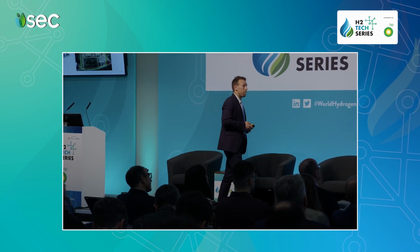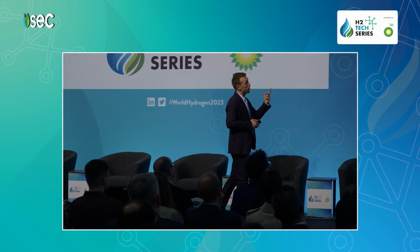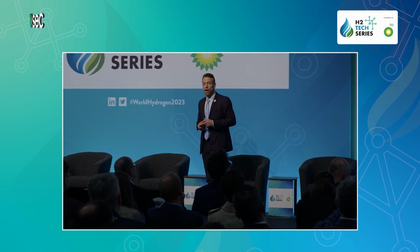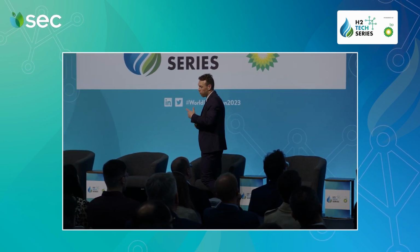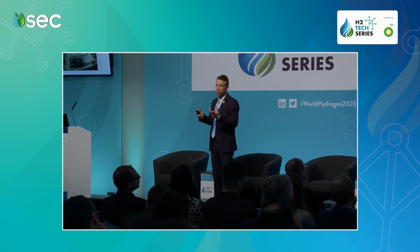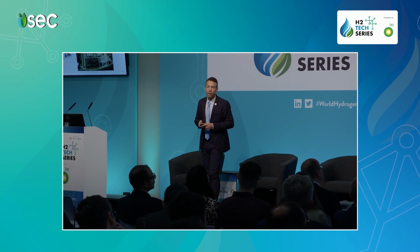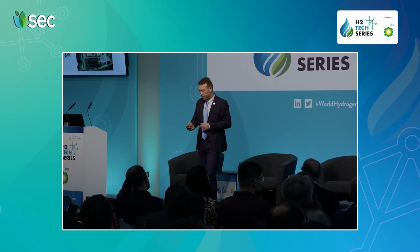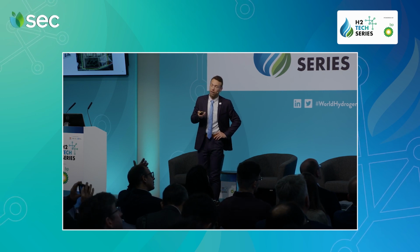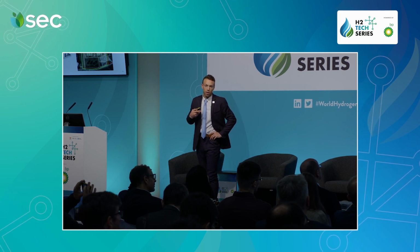Australia, we have been working and doing quite a lot extensive project. It's a 550 megawatt. We started in 2022. The year of the startup for this one is 2025. We are still in pre-feed stage, but it's moving quite quickly to the feed, where we'll do also a basic engineering design package together, Plug Power and the EPC, to de-risk, limit, and define completely exactly what the project is expecting. Electrolyser, in a similar fashion, will be built and assembled as close as possible to the customer, so in Australia.